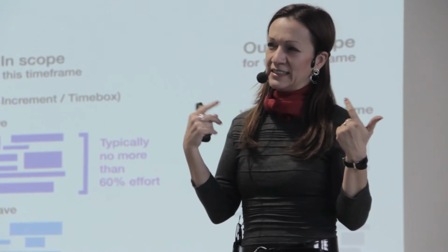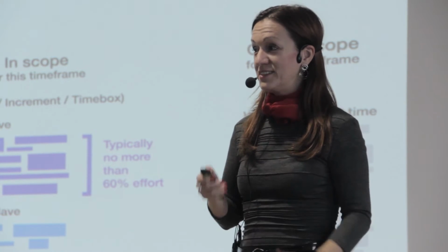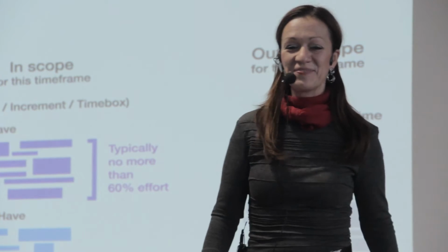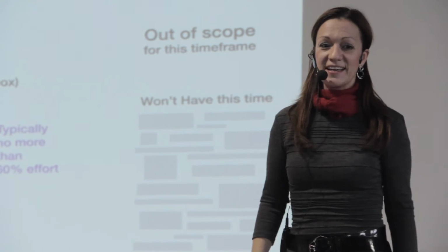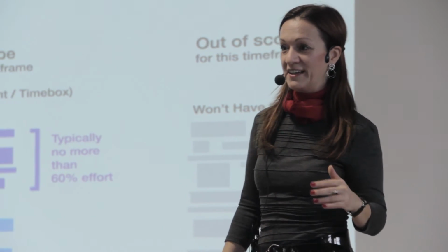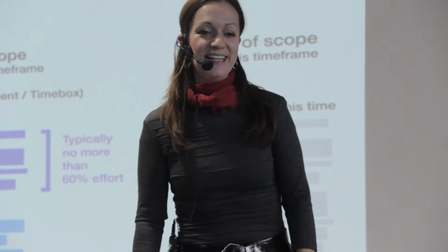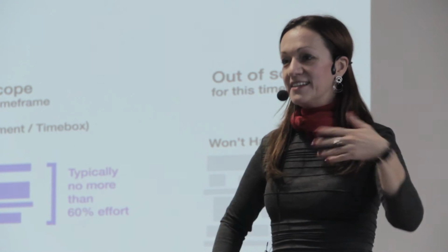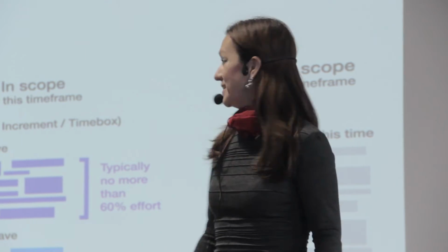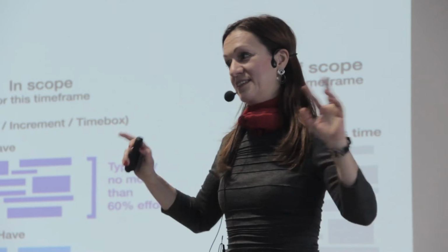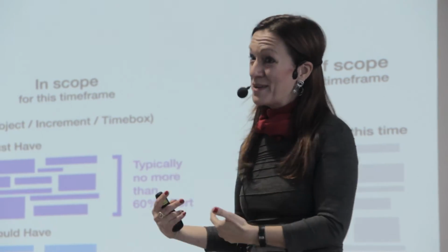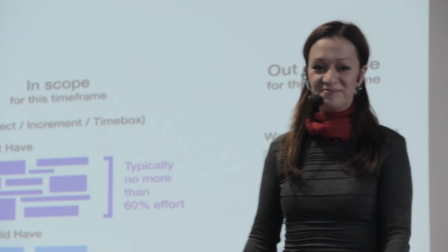So one technique for prioritizing that I like a lot is called MoSCoW, actually. So we would be missing two O's here. These are, first, the must-haves. These are those that absolutely need to be there in order to achieve the objectives. Then we have the should-haves. These are those that are really good, but we might have a workaround to achieve them. And then we have the could-haves. These are the nice-to-haves, yeah? Nice colors, nice gadgets, and so on, but we may succeed even without them.